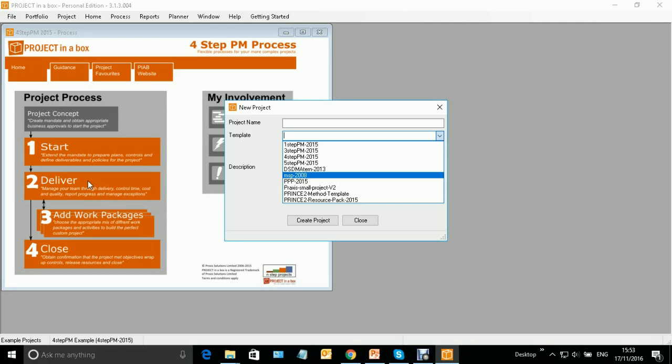In practice, Prince2 has obviously a thing about tailoring the method. You're supposed to tailor the method to match the type of project that you're doing. That's often very, very difficult for people new to Prince2. They're trying to do the most difficult thing the first time they start to work on their first project. So by having these standard sort of project environments here, you can pick up a full one, or you can go to something much lighter and use that instead on your projects. And once you get a feel for all that, you can then start to personalize your methods here and have some different starting points to work from.